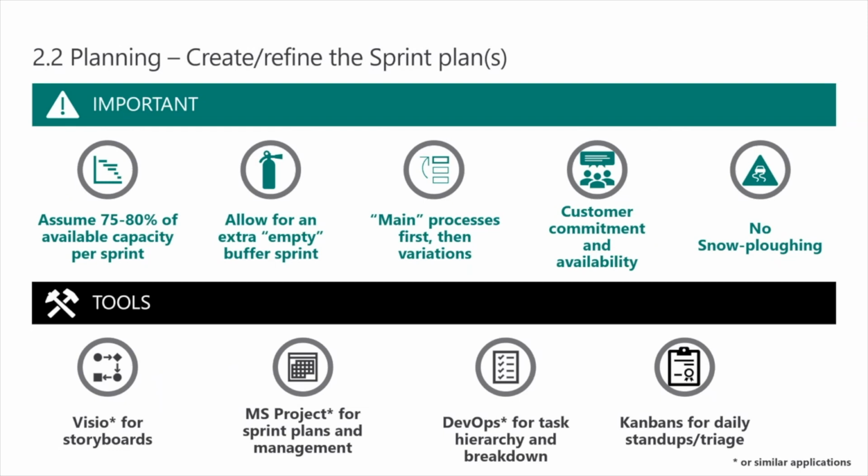So you can keep your dates for start of user acceptance testing, for user training, for go live, and so on. So you create that buffer. It allows you to absorb those changes, and you don't whiplash the rest of the project. Right? You allow the committed dates to stand because you're absorbing the unknowns within that buffer sprint.